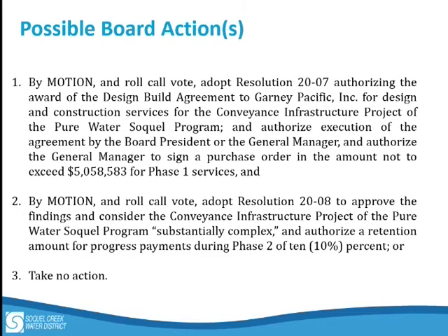Any questions? Dylan, you know, it's a big ticket item, very big ticket item. So the independent cost analysis, can you tell me more about that? I can. That was performed by Brown and Caldwell, independent of Kennedy Jenks, independent of Garney, and a gentleman by the name of Scott Higby is based out of Colorado, and he took the scope of work, which is attachment one, and he went through it task by task, and basically did it as if Brown and Caldwell was going to be performing that work.